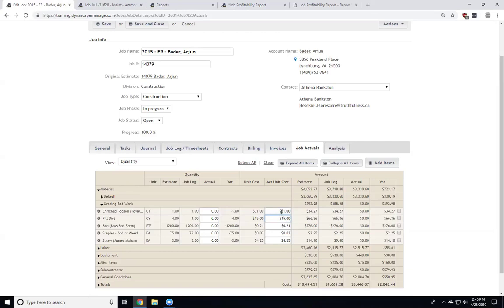When we get the receipts back, we paid more for this topsoil, we paid less for this topsoil, or the stones, or the sand, the mulch, the plants, whatever the actual cost was, you can adjust it. This actual unit cost will not be changed as timesheets are approved because they are just doing the quantity component. So if you do that, you can fill that in as well.